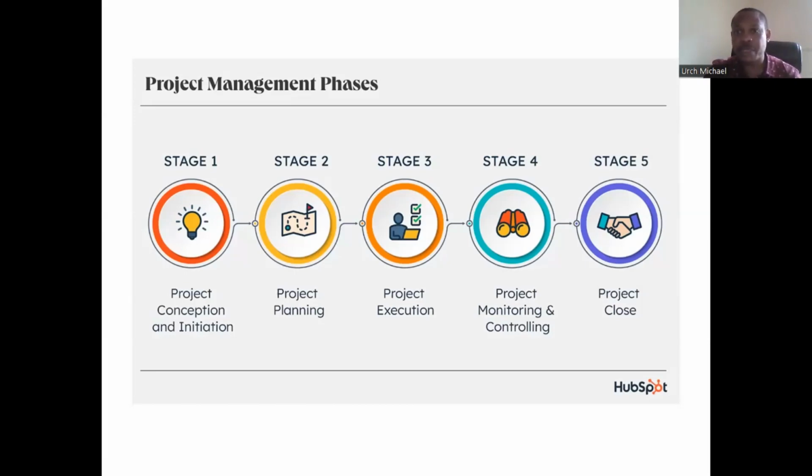Then at the end of the project, there's going to be project closing. If your project is not properly closed, your project is not completed. So bear that in mind for those who are writing the PMP and CAPM exam. Once your project is not properly closed, all documents are not closed, your contract agreements have not been properly concluded, signed and settled, you have not gotten validation from your end users or from the clients, from your key stakeholders, then you can't say that your project is done.